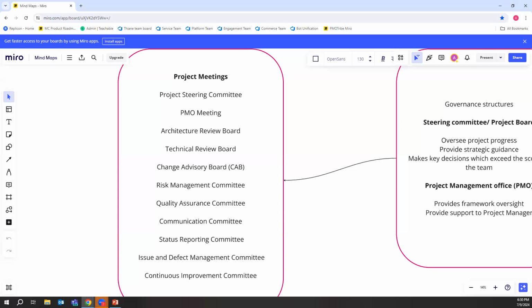This you can generally do once a week, and it doesn't have to be a long meeting, 45 minutes to an hour. Sometimes, stakeholders are fine with getting an email update. I generally don't like email updates, but if that's the nature of the organization, that's perfectly fine as long as the update goes out to them. But that's where the detail sits. All right, that's where your lower level detail, where we talk about capacity and we talk about missed deadlines on task level, on deliverable level, but does not impact the project greatly in terms of delivery dates.